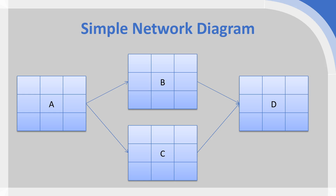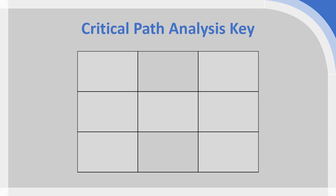This is where critical path analysis often seems intimidating, but it is relatively simple maths — just a matter of wrapping your head around it. If we take a square and make it larger, at the middle of the square we have the activity code itself — the unique activity code from our activity list. To the right, in the middle-right square, we place the duration of that particular activity, which in this case is in days, but could be in hours or weeks depending on how large your project is.